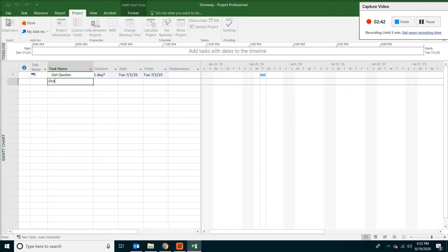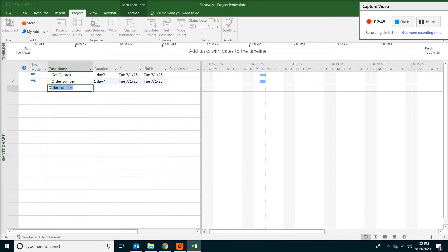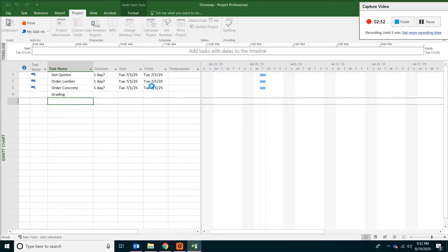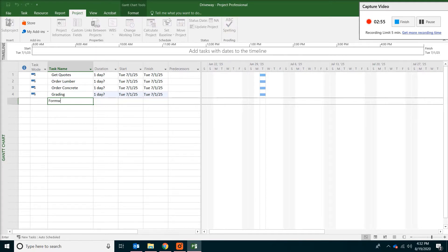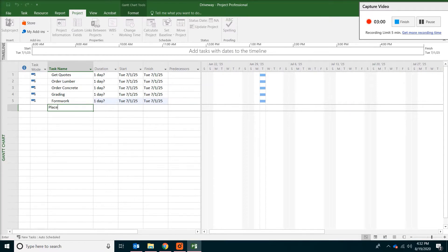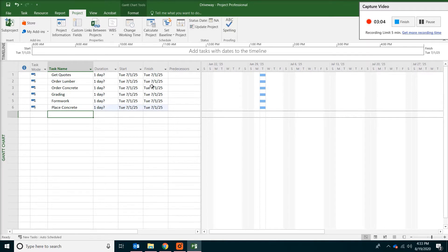We have to order some material, lumber, and also concrete. We need to do some grading usually. And formwork. Finally we will be placing of the concrete.